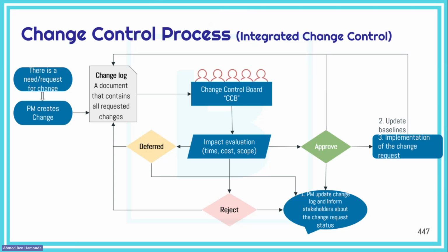It's like in the courtroom, and then they call us in and they give us their decision. Either they will defer the change request, asking for more information, or they will reject the change request, or they will approve the change request. Now, whatever the decision of the change control board, I definitely, as a project manager, need to update the change log with the decision and also inform the stakeholders about the change request status.